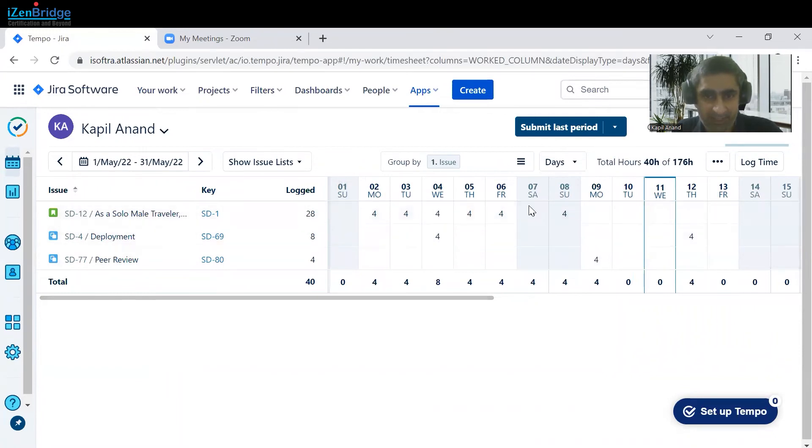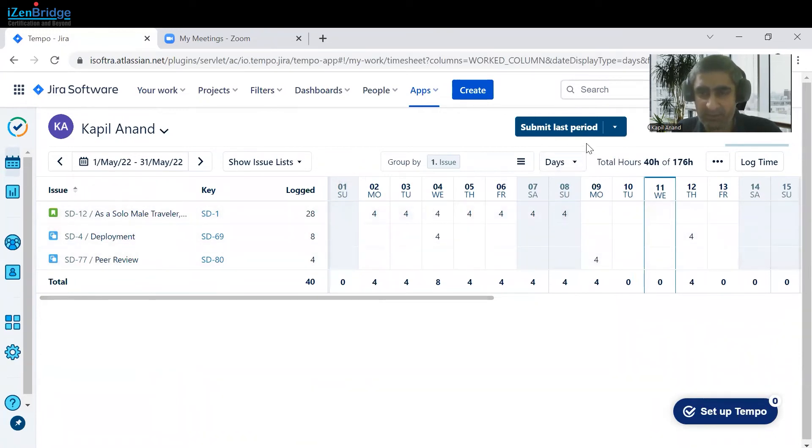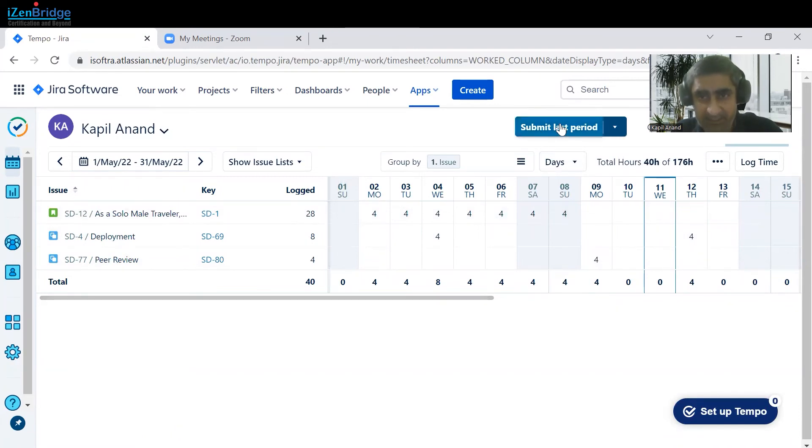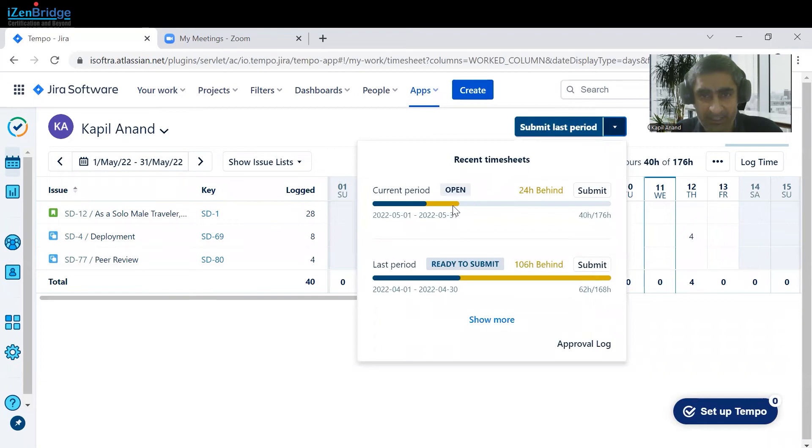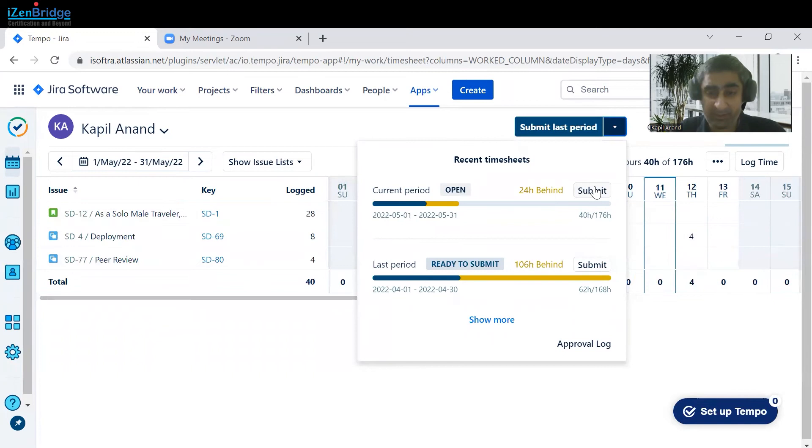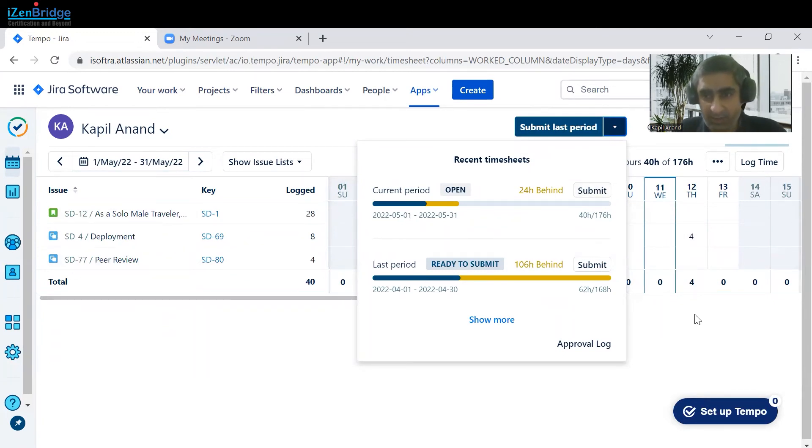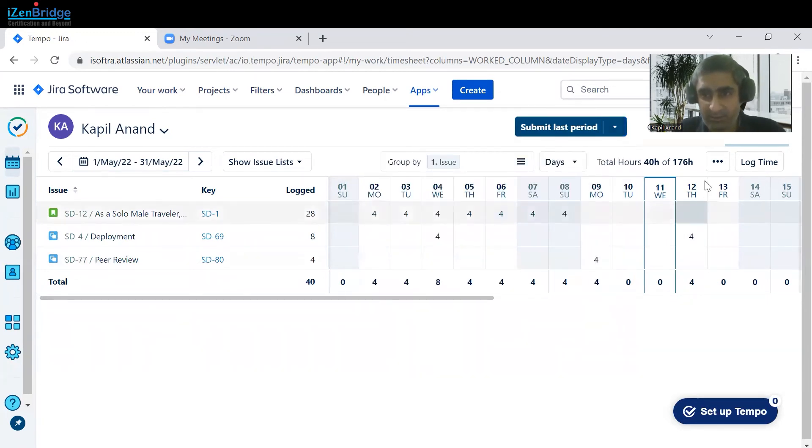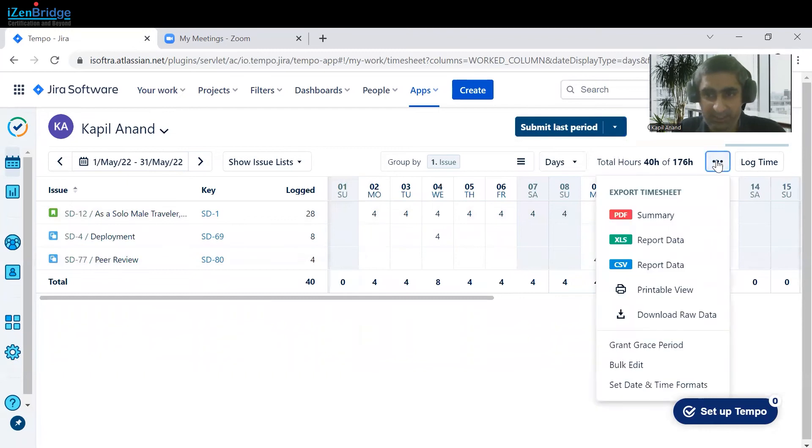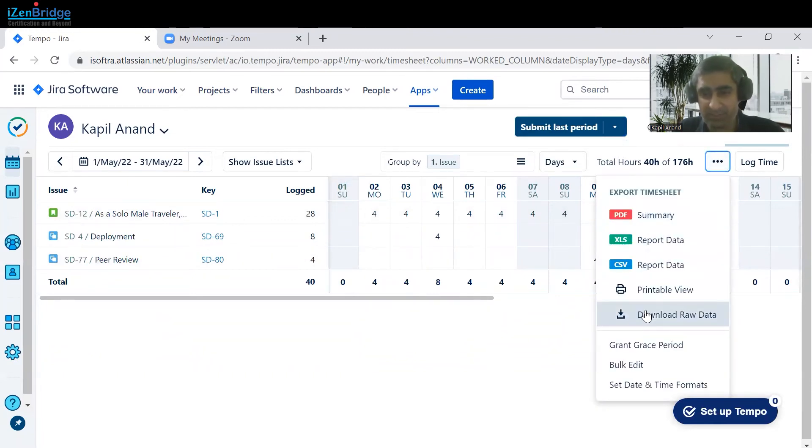And when that time period is completed, say after a month or a sprint, the timesheet is getting submitted. I can submit this period by clicking on that. After the submission, approval would be done by your scrum master or project manager. Or you can download this sheet as well if you want this data in Excel and want to do some other kind of work over there.